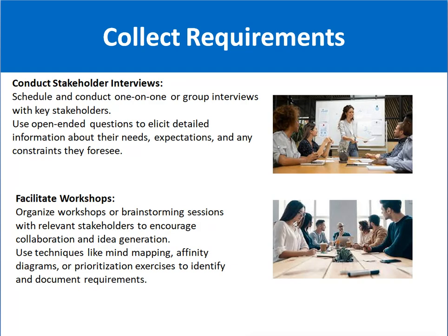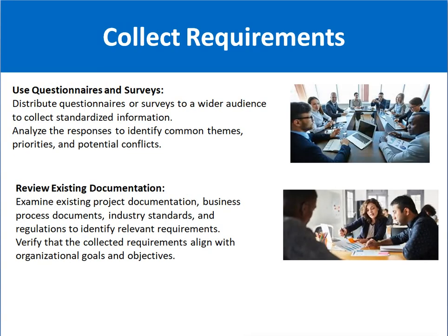Then facilitate workshops. Workshops are brainstorming sessions in which all the relevant persons are sitting together. They are collaborating and generating ideas, discussing different ideas so that they can reach some consensus. There are many techniques like mind mapping, affinity diagrams, and prioritization exercises to identify and document the requirements as well.